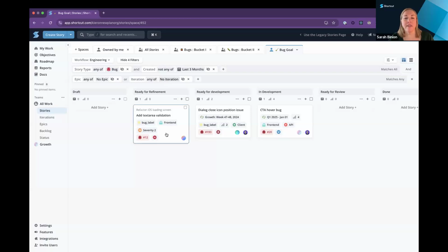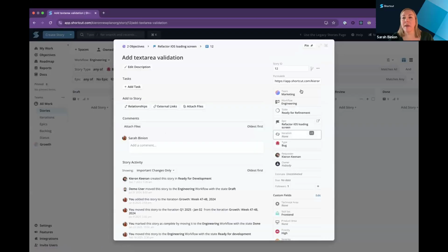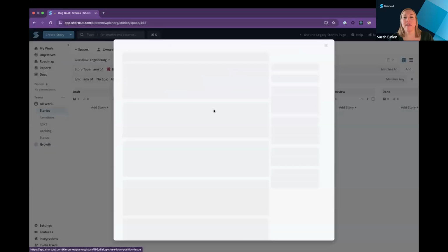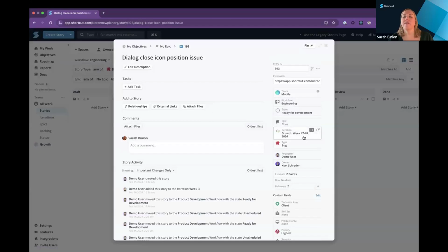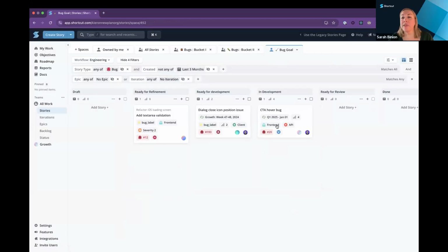And if we look at this ticket, this one is in an epic, but it's not in an iteration. And this one is in an iteration, but not in an epic. So these are probably going along the lines where I might want to revisit why we haven't solved these bugs according to my original chart. I either cancel them out, archive them, or just put a little influence with them to make sure that they get on the roadmap.